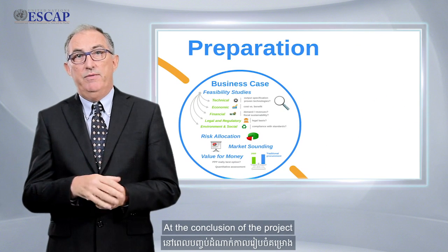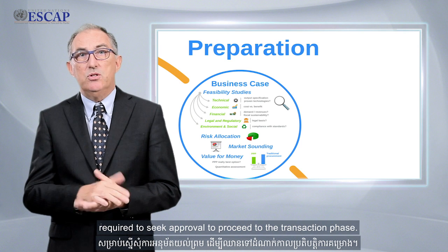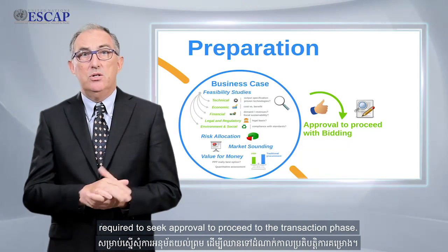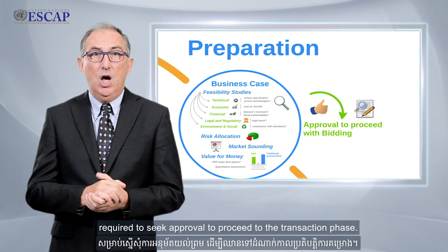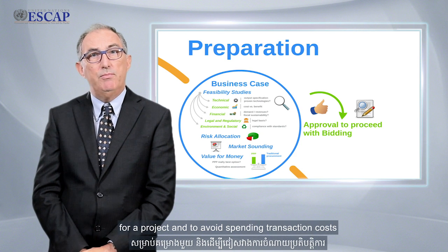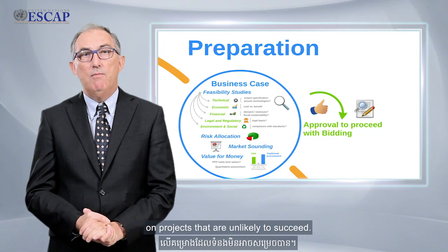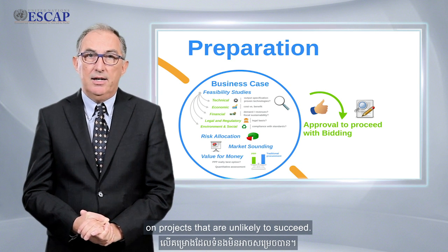At the conclusion of the project preparation phase, you should have all the information required to seek approval to proceed to the transaction phase. Approval is necessary to confirm the political buy-in for a project and to avoid spending transaction costs on projects that are unlikely to succeed.